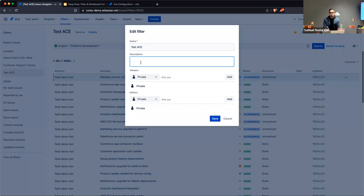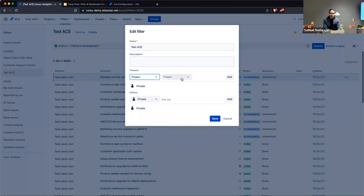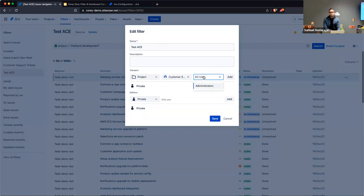If you go down further you can specify who can view the filter. There are four options in the dropdown. One common use case is sharing with people who have access to a particular project — for example the Customer Support project. You also have the added ability to narrow it down to specific roles within that project, such as administrators, managers, users, or team members.